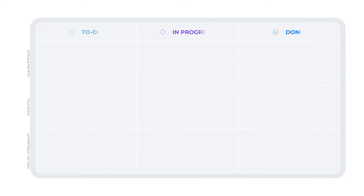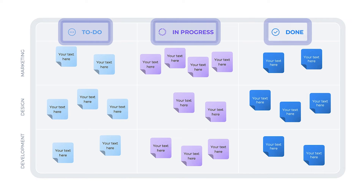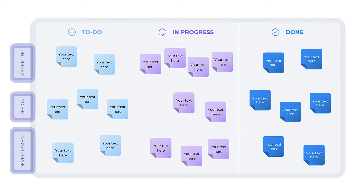For instance, Spotify implemented Kanban after they struggled to execute projects. They decided to go for a simple approach with just three sections: to do, in progress, and done. This was so team members wouldn't get overwhelmed with tasks. In this example, tasks are organized by lanes or departments instead of by individual team members.